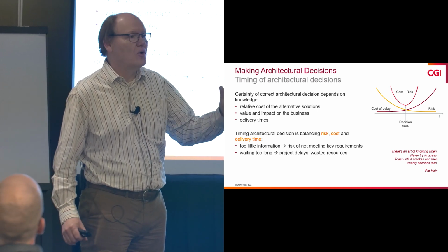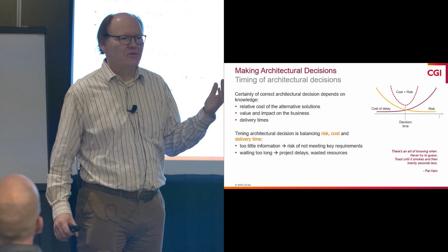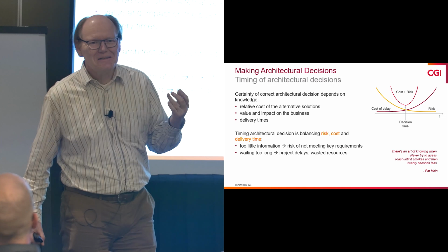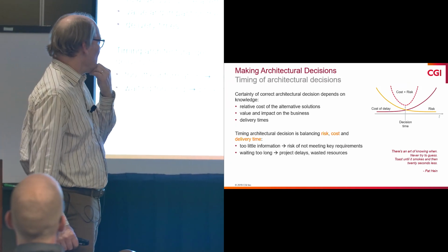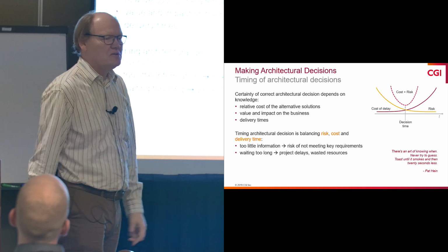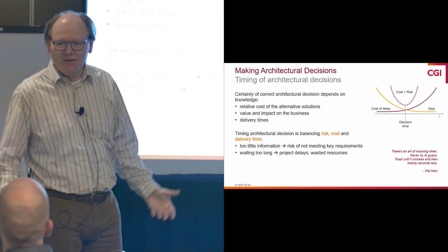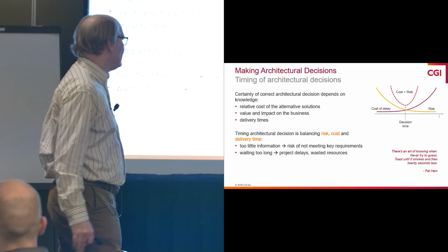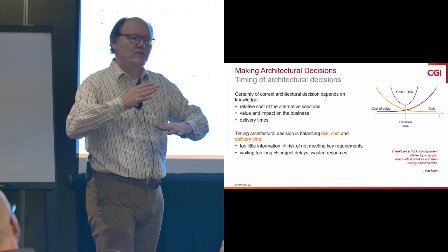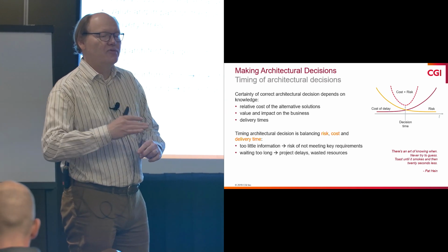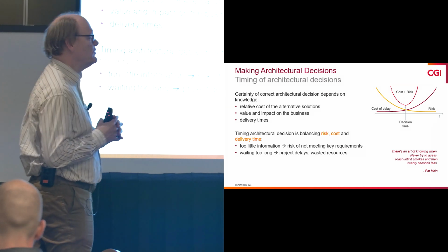So if we don't decide now which hardware it's going to be, or what am I saying? Nobody orders hardware anymore nowadays, right? We just do it in the cloud. But you know these situations, okay? The team can't go sign the contract. Basically, the timing of your decision is a trade-off between the risk of making the wrong decision and the cost of the delay of not making the decision.